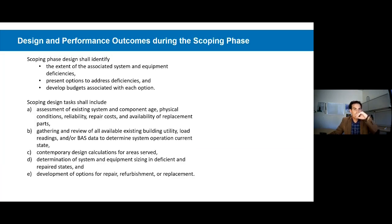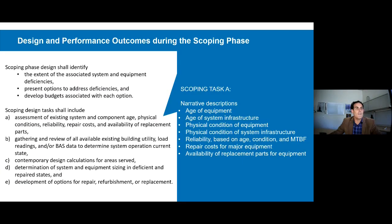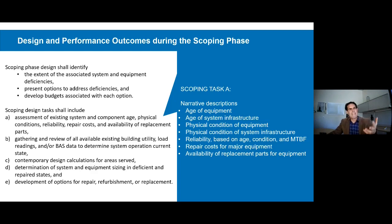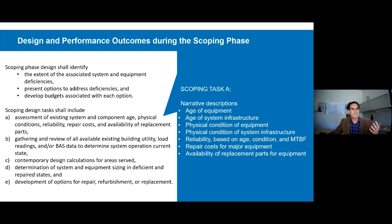This is the same language given in bullet points so that we can walk through it and start talking about it. Task A is assessments, and this is a pretty traditional piece of scope — we would review equipment data, do a field walk, and then write up an assessment. All the items listed here should be in that write-up: the age of the equipment, the age of the overall infrastructure, and the physical condition of the equipment and the infrastructure around it.